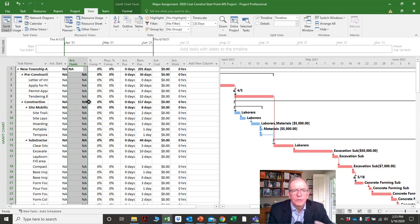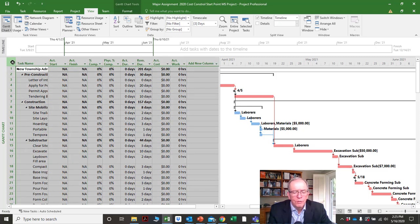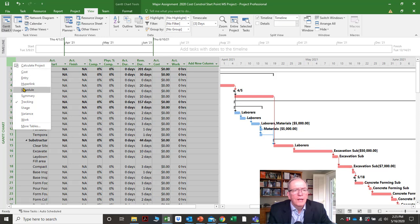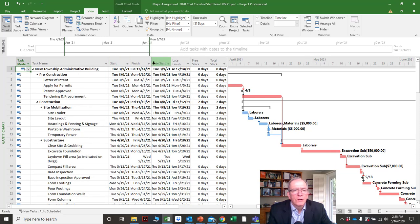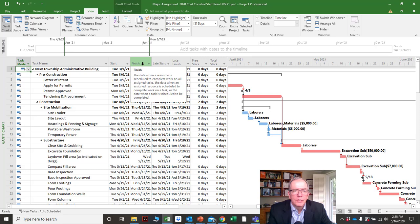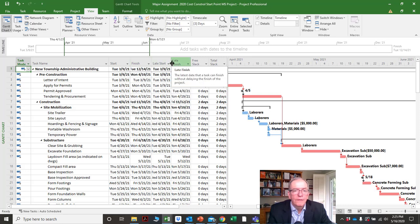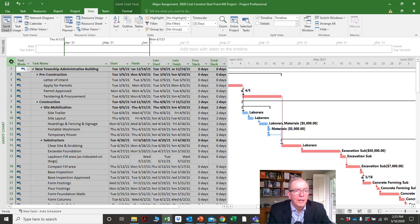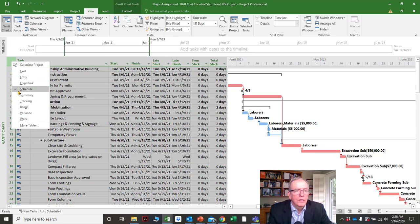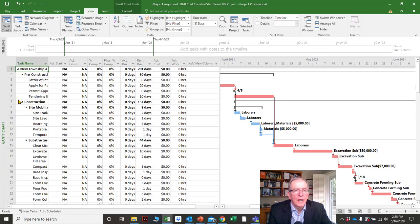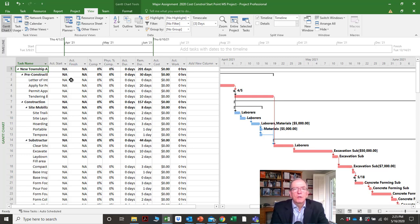There are so many different start and finish columns. In the schedule view, start and finish means early start and early finish — it's the plan. Late start and late finish are another two column names. Now over here in the tracking view, I've added actual start and actual finish.